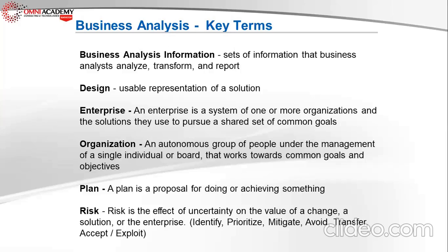So in that time, a project manager should ask the BA, give me your list of stakeholders so that they can also consider this in the stakeholder analysis. So you do the stakeholder analysis according to the business aspect and you give it to the project management. So it becomes the stakeholder analysis of the whole project. If you do it early, like in the project planning phase, then there is no point in forgetting about it. But sooner the better. So if you forget the right person, you later on find out.